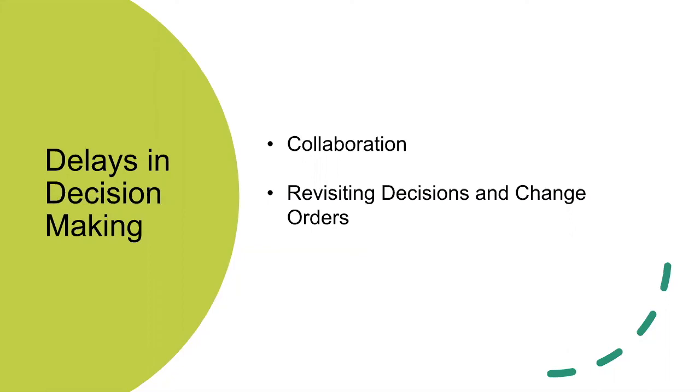Collaboration. Studies prove that stronger previous collaboration relationships in decision groups contribute to more timely decision-making. Large decision groups should be avoided because coordination of meetings can take a while to schedule, and lack of effective communication can delay decision. Another reason is that larger groups have a harder time reaching a consensus and may lead to a delay in decision-making.